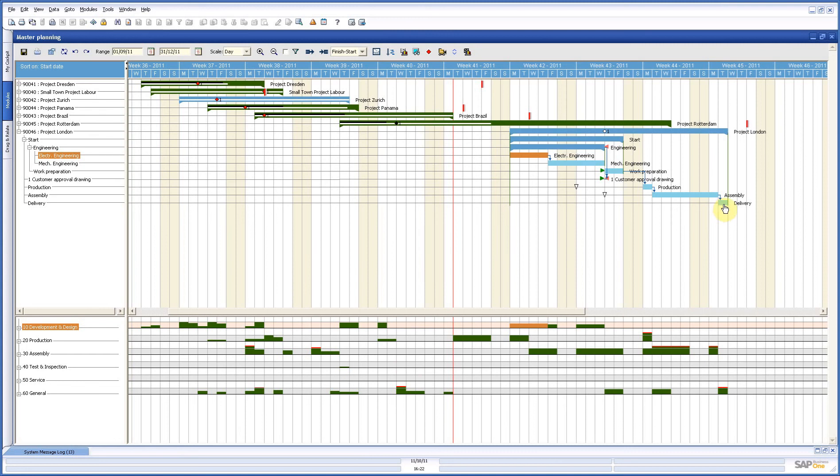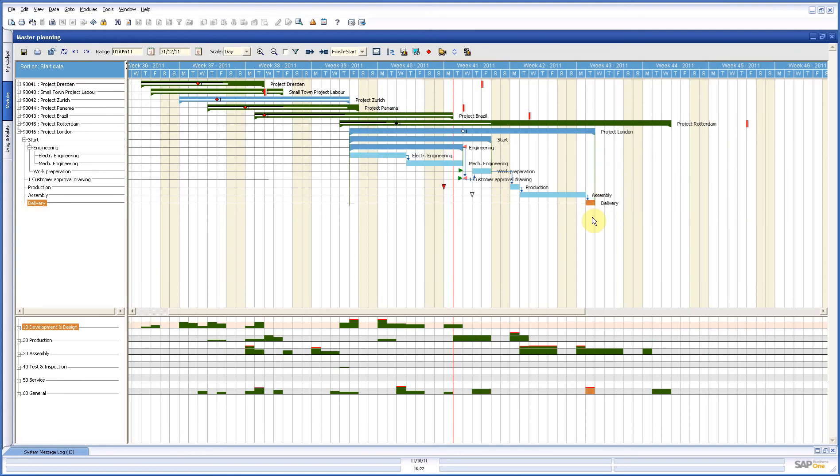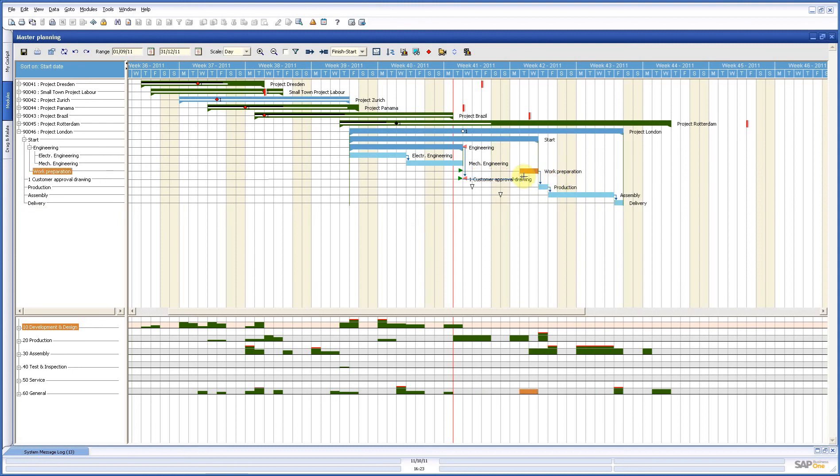We also have start-start and finish-finish constraints where activities have to start or finish at the same day. Now, how does it work? You have seen it already. I can also put it back. If I say I want to have my last activity started here, then everything, because of those constraints, is moved back. If I put this one and put it to the right, then only everything underneath here is going to the right because these constraints are valid. So, you can move and manipulate your planning very easily.